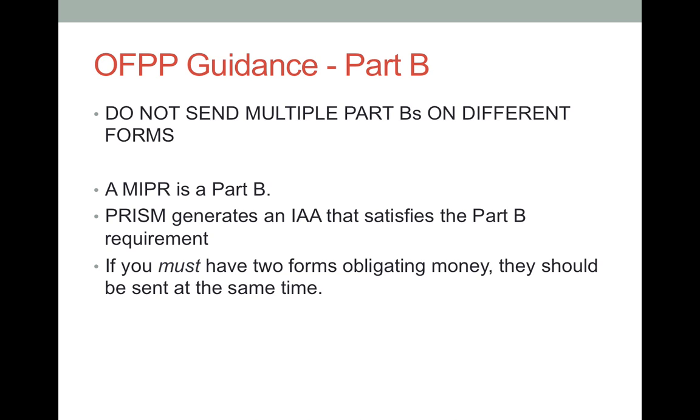If the duplication is not caught and doubly obligated on DOE's contract, I question whether DOE will be found to be the primary offender to the Anti-Deficiency Act. The 7600 requires DOE to sign 3 times. That's already excessive. Don't ask for more signatures than that.